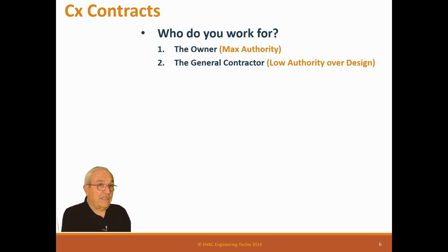So anytime we take a contract to the general contractor, we have a clause in there that says we are working for the general contractor for the ease of payment stream for the owner, but we still report to the owner. All reports, all knowledge, all actions will go directly to the owner.